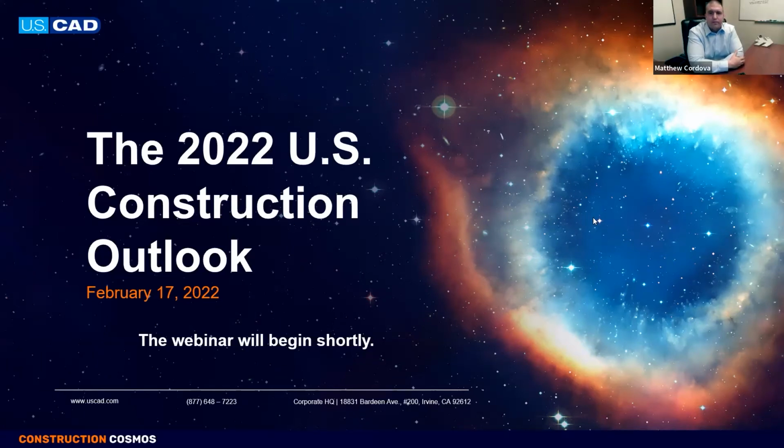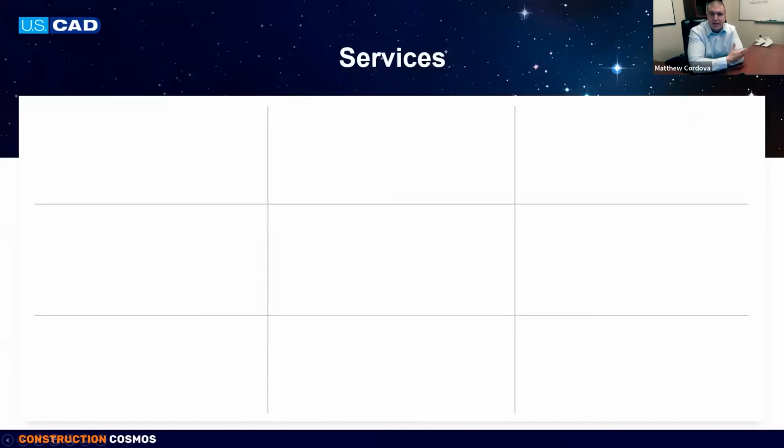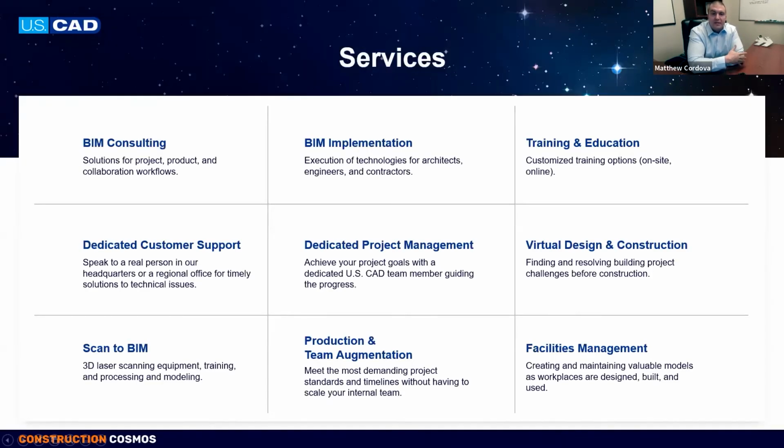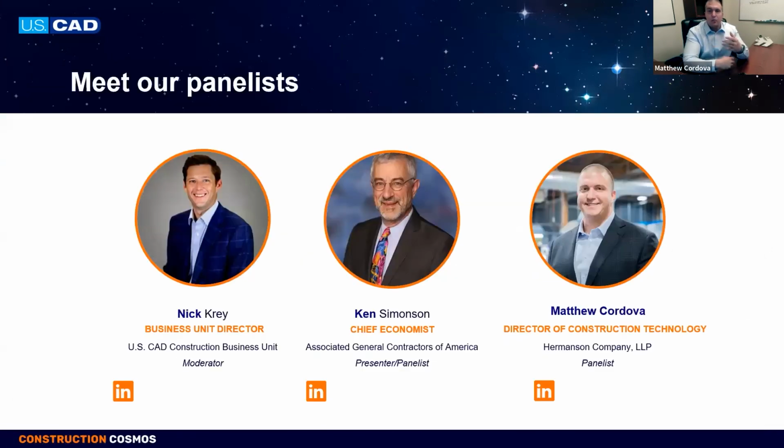Yeah. So for Hermanson on the construction side, as a mechanical contractor, our ability to control or change design, depending on what it is, whether it's design build, integrated design, or even plan and spec, changes the landscape of what we're doing. For example, 25 years ago, we would have a paper drawing. We would estimate off of it, bid off of it, do takeoffs off of them. And then we would go in to construct and find issues. It was handled via RFI. So construction for that part of the building stops until the answers come back. Schedules have to change, orders are processed, money is spent, time is wasted.